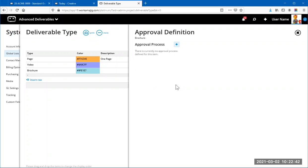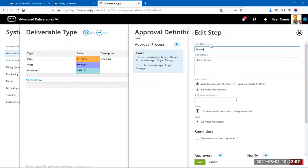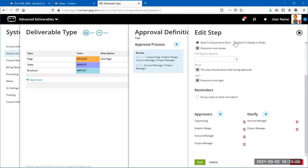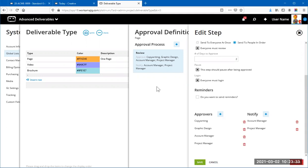For videos, you can define a more complex approval process — for example: sales team reviews first to make sure it matches expectations, then a legal review to ensure it's okay to publish, then management review. You could set this up as a multi-step process. Rather than using 'Send to People in Order' with everyone in one step, you might split it into two steps: one for the creative review with copywriter and designer, and another for management review with account manager and project manager.